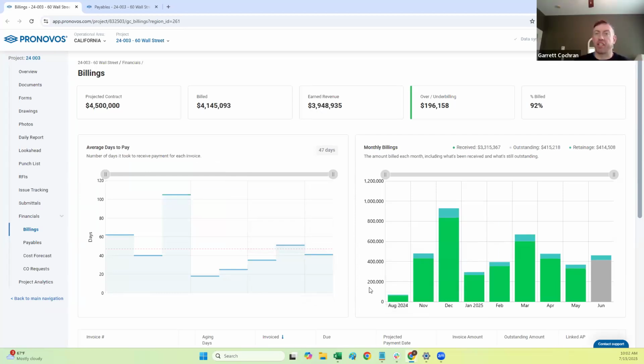As a former PM, do you have a rule of thumb of, hey, this is kind of getting to the red area, or is that probably 90 days plus? Yeah, I mean if it's 90 days plus, it's definitely deep in the red area. I know back in my PM days, if anything was over 30 days, that's when I would start reaching out to the client to see what's going on with payment.